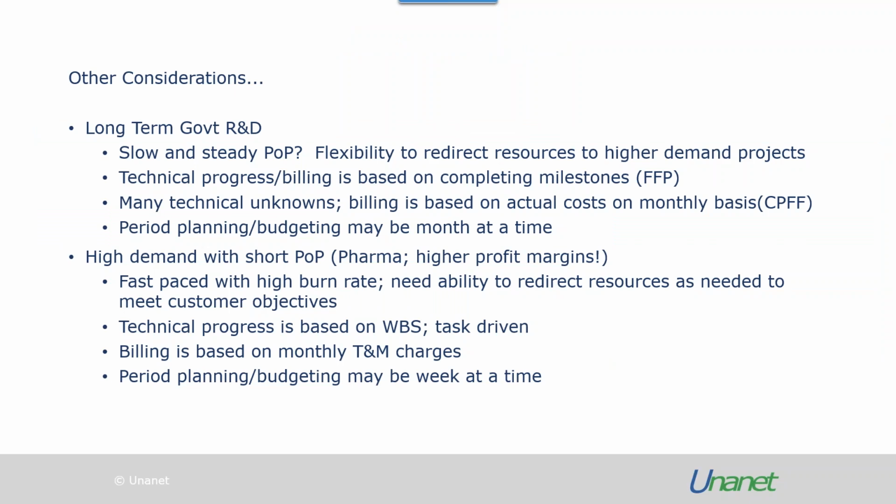Other considerations. So for the long-term government R&D projects, these tend to have a slow and steady period of performance with the flexibility to redirect our resources to the higher demand projects. The technical progress in billing is based on completing milestones for firm fixed price, or is based on actual cost on a monthly basis for the cost plus fixed fee. And the period planning budgeting tends to be a month at a time.